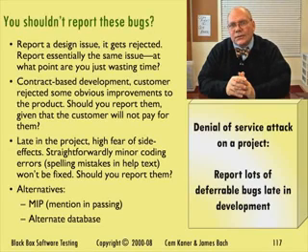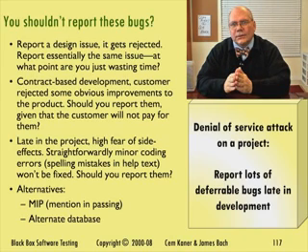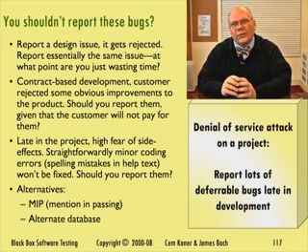A different approach that I prefer is to use an alternate database. Imagine we're close to finishing release 2 of the product. A few months later, we'll start release 3. Rather than reporting a minor bug against release 2, why not put these in the release 3 database right now? The triage team won't officially look at the release 3 database until later, but anybody who wants to look can look at any time. And so if the project manager and some of the programmers skim the database, they might pick out a few things that they say, oh, that might be trouble, let's just check. And by being in the release 3 database, when release 3 opens, these things are there early. They might actually get fixed.